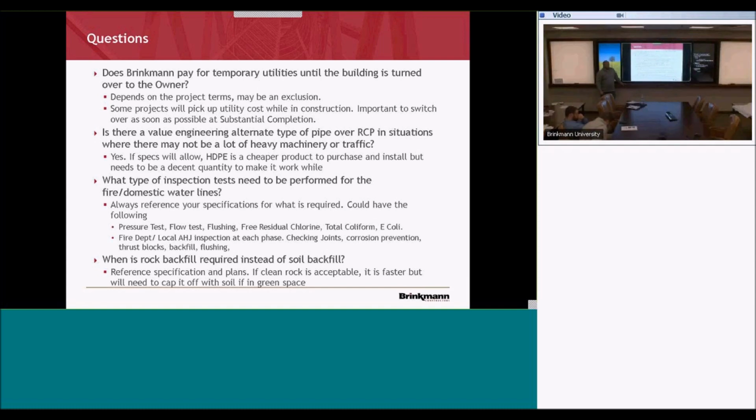The owner's got to call and they can do it, or there's form work that's got to be filled out. If there's forms that need to be filled out, Brinkman needs to get those packaged up, presented to the owner, so that they don't have to go and chase down all that information. That helps build that relationship with the owner, make their life easy, right? Build them a great product, and then they're gonna come back to it.